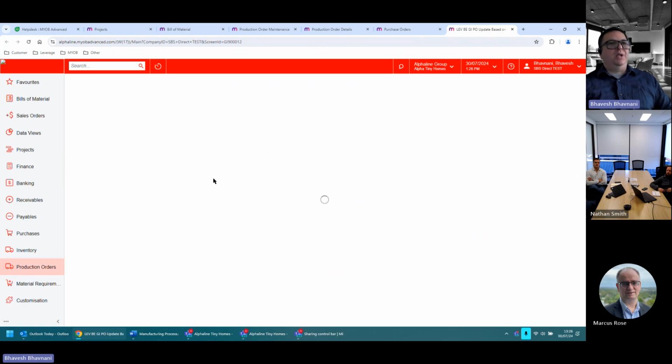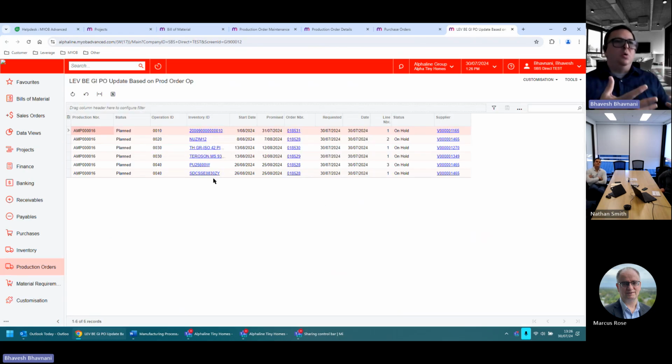I've created a small generic inquiry to give you an overview. With this production order, these are all the purchase orders that I've created. The start date is the operation start date for each individual item, and the promise date is the promise date of the purchase order. So the start date is 1st August, promise is 31st July; 8th August, 7th; 13th, 12th; 26th, 25th.